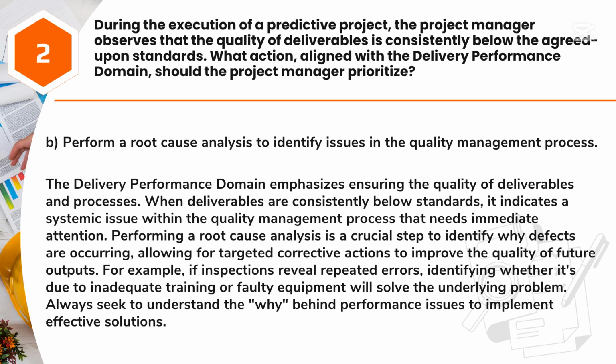Answer: B. Perform a root cause analysis to identify issues in the quality management process. The delivery performance domain emphasizes ensuring the quality of deliverables and processes. When deliverables are consistently below standards, it indicates a systemic issue within the quality management process that needs immediate attention. Performing a root cause analysis is a crucial step to identify why defects are occurring, allowing for targeted corrective actions to improve the quality of future outputs.